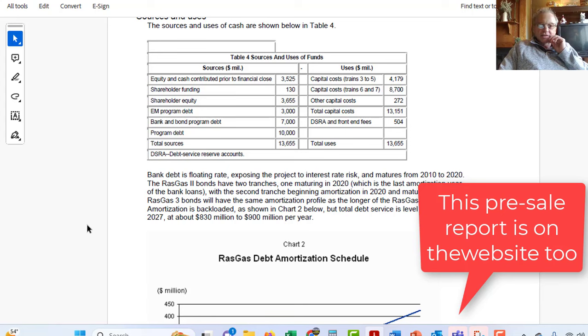we get their EBITDA. And then, of course, they didn't show what the project IRR is, but they did give you this construction cost. So I assumed, based on the thing, that they're spending it flat over 5 years. Now that might not be right. So on this one, there's a little formula. If they spend it over 3 years, then the IRR is only 29%. So that's a pretty good IRR, and you have to ask, why can they get such a high IRR? Now you're asking better questions.